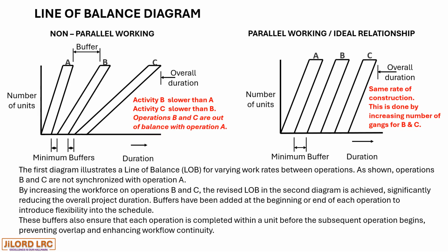To achieve this, you have to increase the number of gangs for activity or operation B and C.